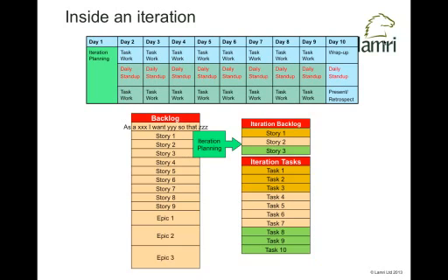What deployment work? Is there anything I need to change in the test harnesses? All that sort of stuff that I need to think about, the stuff we need to do to deliver those stories. That's what we do in iteration planning. We'll also allocate either complete stories or individual tasks to members of the team. Members of the team will say, yeah, I'll do that, which is back to this idea of a collaborative, self-organizing team. The team will say, I'm responsible, I'll take this story or that story, and I'll do the stuff that's needed to deliver it.